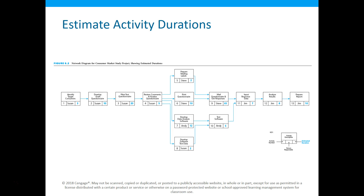So we're going to jump ahead a little bit and show you something called the critical path. From task one to task two to task three to task four it's pretty clear there's not really an alternative. But here's where I have a couple of different routes I can leave task four. Critical path is weird — I want the shortest time for the entire project, right? But when I have a multiple decision like this, I'm going to take the longest time. I always take the longest.